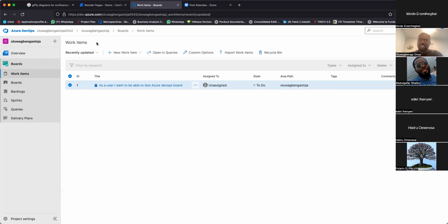The roadmap is that we want to build this app. This app is a transaction or Forex exchange transaction app. In the first 3 months, I want to be able to build all the authentication, the user login, all of that, integration to Nigerian banks, for example, integration to a service that will help us with converting exchange like AUD to Naira.